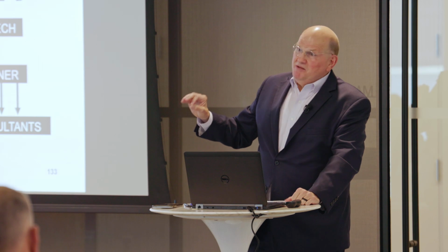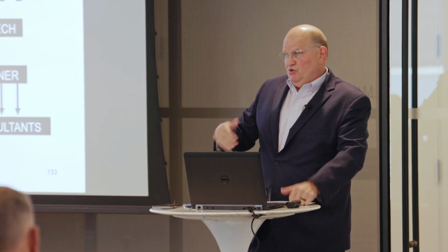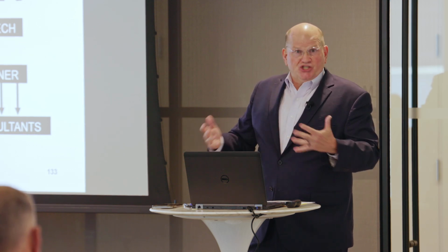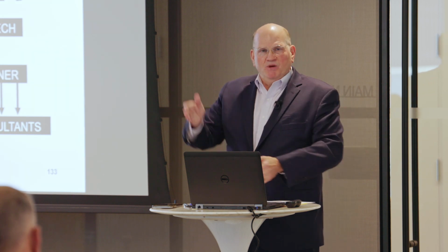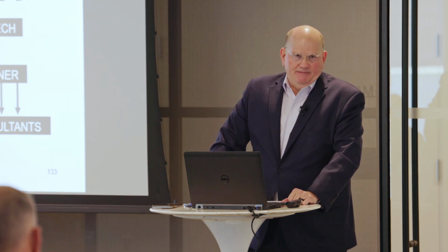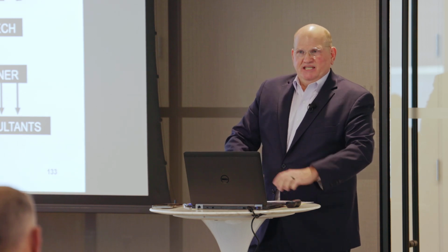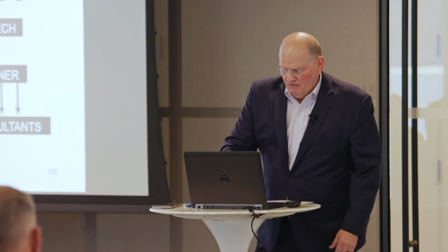And if you come out of the box and accuse the design professional in your correspondence and to the owner that their designer has committed malpractice, one, you've raised the bar that you've got to satisfy psychologically, and two, you've probably pretty much ticked off that designer, as opposed to talking about it just sort of like a different site condition. Stuff happens. It's a defect. This is a problem, rather than personally attacking them and besmirching their professional reputation, where they may react a little bit more vigorously than if you just identify a general problem.